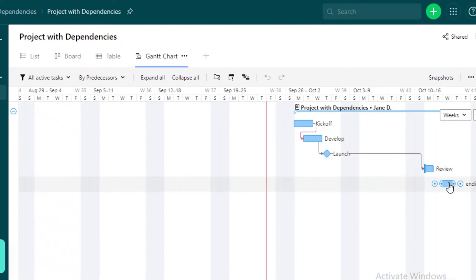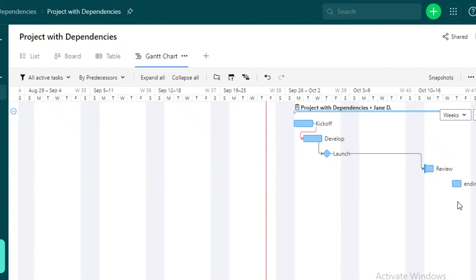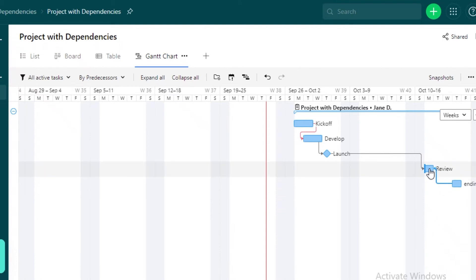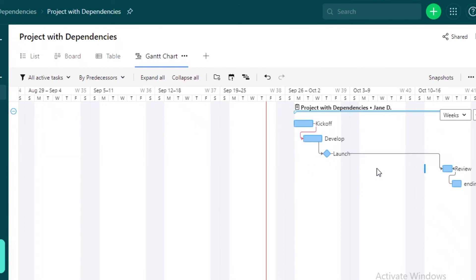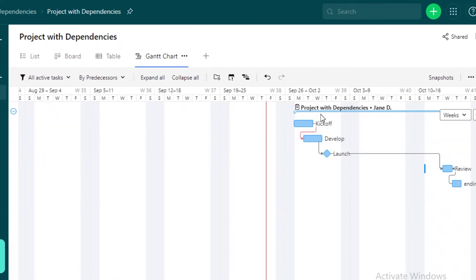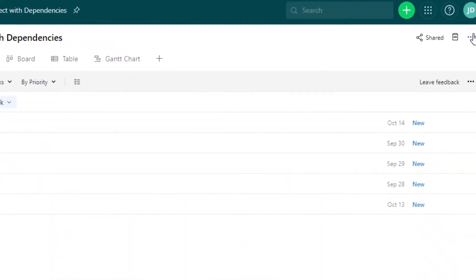So if I was to do this. Now, if I want to add this ending and connect it to the review, right now you can see they're separated. If I want to connect these both, you can see these dots. I'm just going to do a left click and hold the left click and then I'm going to join it to review. Now you can see our review and ending have been joined and all of this is going to be an automated process as well. If things are on kickoff, once the kickoff has been completed, the timeline for kickoff has been completed, it's automatically going to move on to development and then launch and so on and so forth.